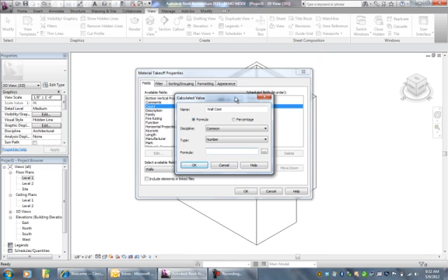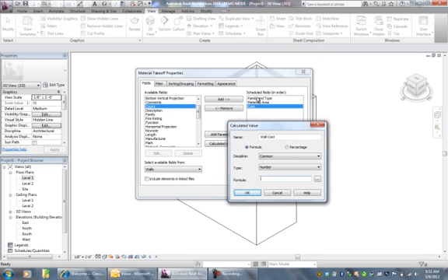So, for the formula, you have to use the things that you've selected. Our formula would be Material, colon, space, Area with a capital A, times, the little asterisk for times, Cost with a capital C. Now, it's not going to like that you're multiplying a number cost by an area in square feet, because that comes up with square foot dollars.